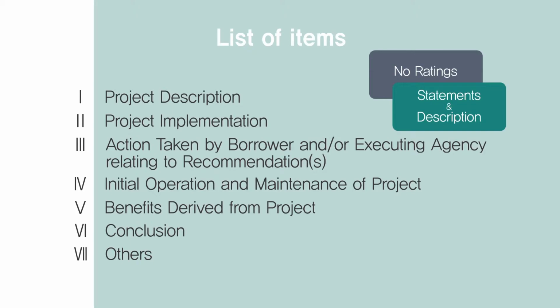All the important problems which have arisen in implementing the project should also be indicated, with measures taken and the results. Each item should be explained by using various materials and documents, such as project progress reports. In addition, drawings and maps of the project site should be attached to PCR so EDCF has sufficient information on the implementation. The data and information on the overall project are contained in PCR, even if the EDCF loan covers only a part of the project.